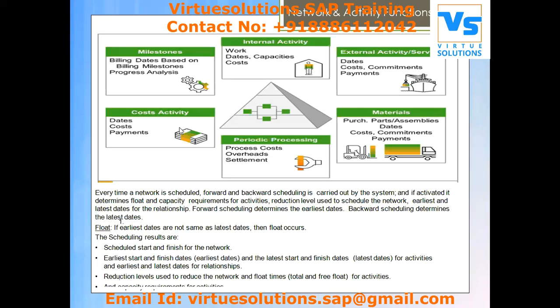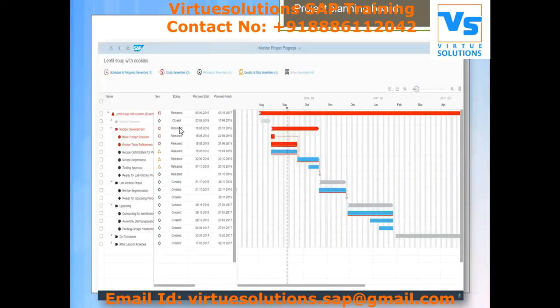So this is a project planning board which I'm just trying to tell you. We're going to create a project. In professional terminology, say it is a kickoff, BBP, realization, or you can consider phase one, phase two, phase three. Like that, you can distribute your activities. Then databases and network activities. The task network activity is nothing but a task. You need to assign those resources against those tasks, and you need to plan accordingly.